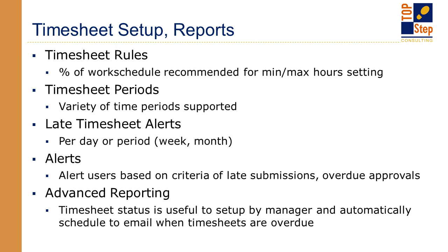Other settings for the timesheets, you can set periods. Generally, I recommend weekly timesheets. However, depending on the organization and your business practice, I do have some folks we've worked with who submit timesheets monthly, and they allow their folks to enter that time monthly and submit once. Me being unable to remember what I had for breakfast, I found it much more effective to enter my time on a daily basis, and then obviously our internal policy is submitting timesheets at weekend.